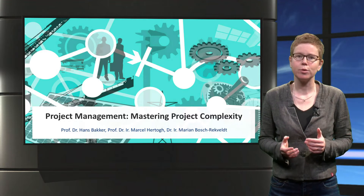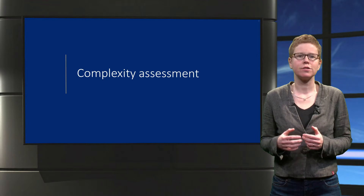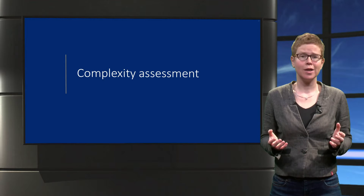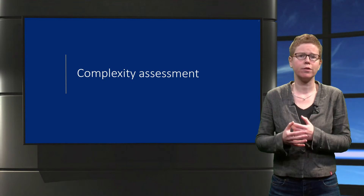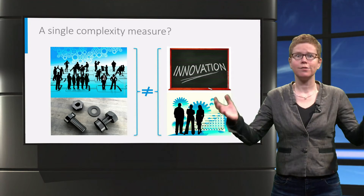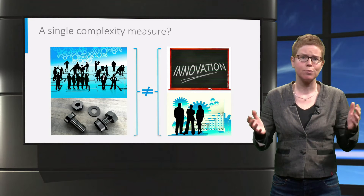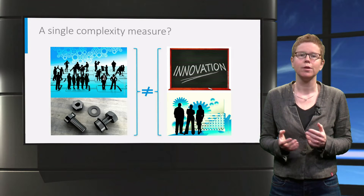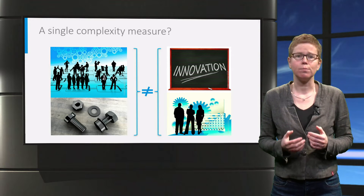When we developed our complexity framework between 2007 and 2009, we started doing a literature study on complexity models in general. To our surprise, the majority of the models found at that time were simply adding up several indicators of complexity. For example, a project with many stakeholders and known technology would score equally complex as a project with innovative technology and a limited amount of stakeholders — but mainly one-dimensional measures were used.